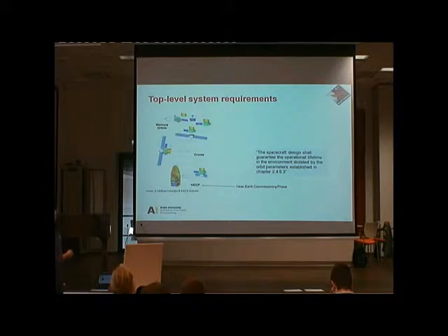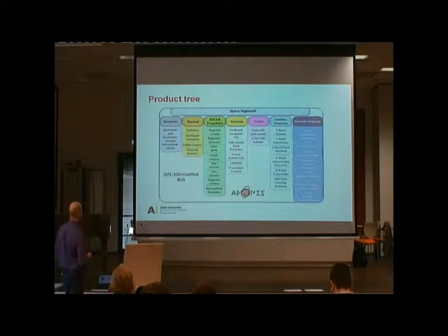And these are coming from different other requirements already. It is important to actually make traceability in your requirements. So every requirement which is not a top-level requirement should have a parent requirement. If you start to write the software, you really find it useful that you actually see where this requirement is coming from, why we need to have some of the very stupid requirements. And then it might be that you really can't do without this requirement.